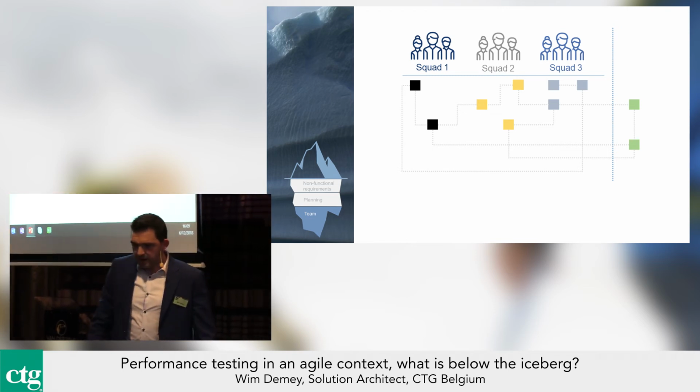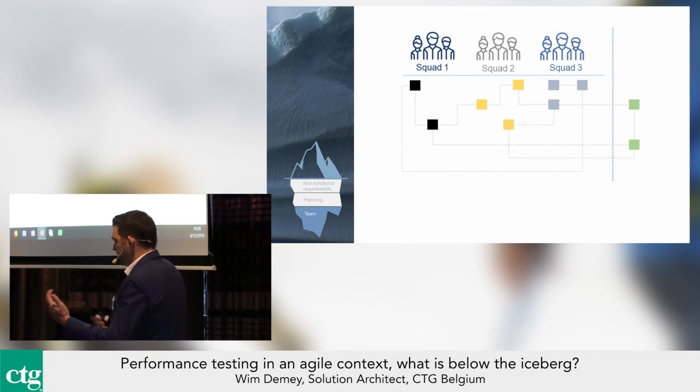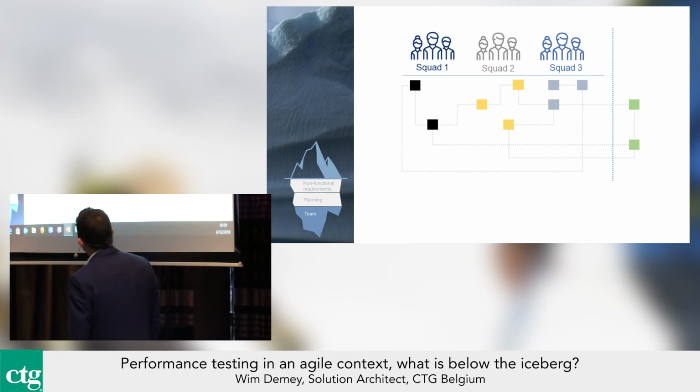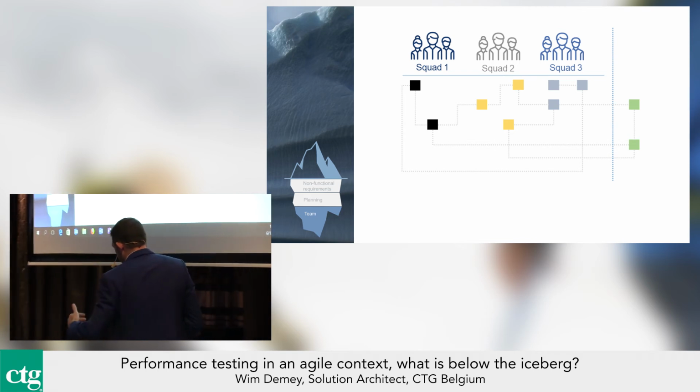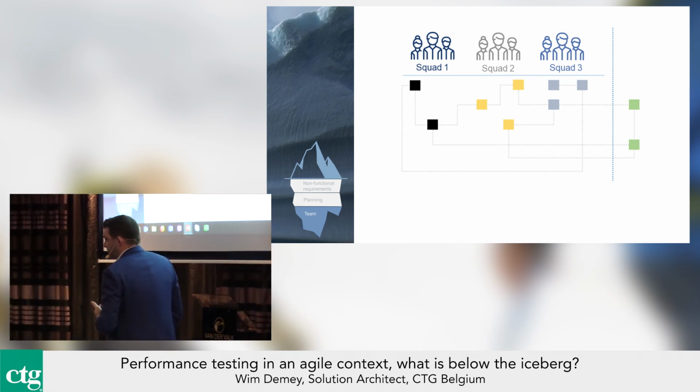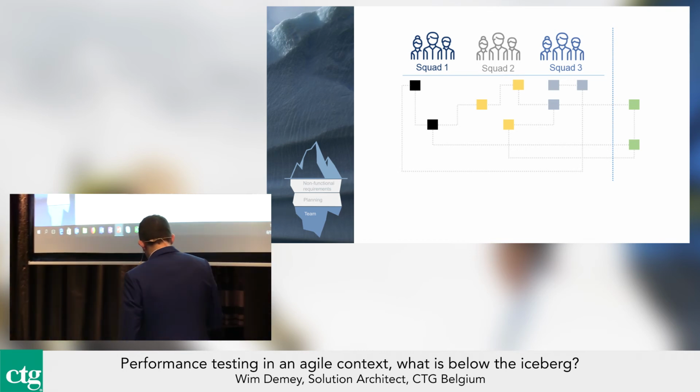Typically that can be tackled in a Scrum of Scrum meeting where you talk about dependencies, or in your PI planning. So to plan upfront, or to think about which kind of performance test do we plan and which kind of support do we need.